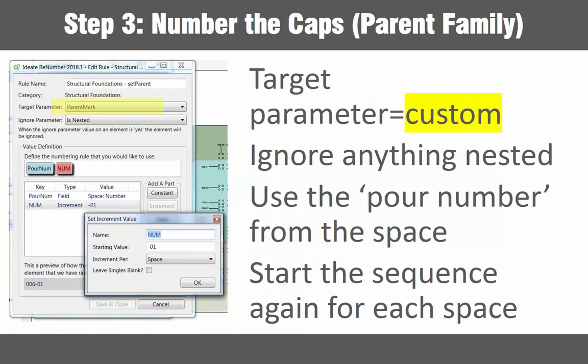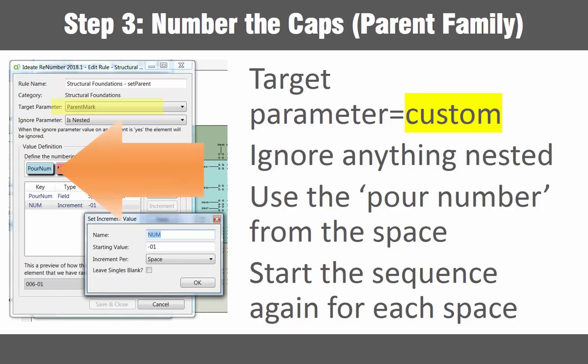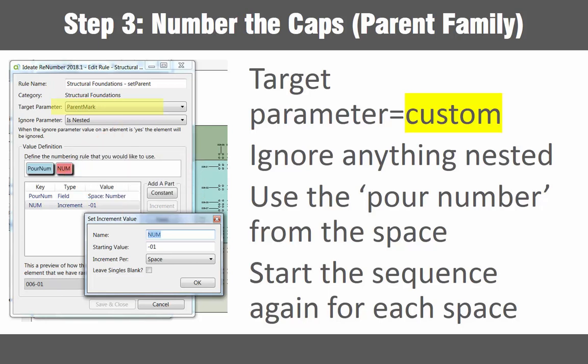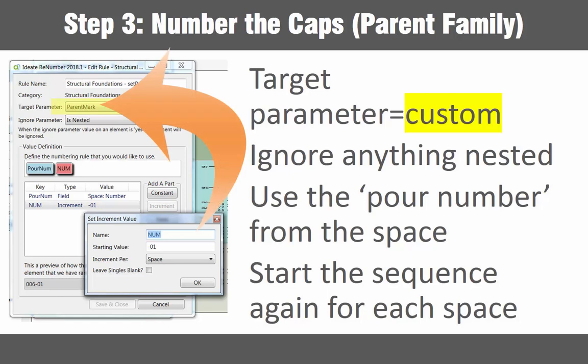Step three is to number the pile caps while ignoring the nested pile families. In our example we will combine the pour number which comes from the space and an increment to fill out a custom parameter we will call parent mark.